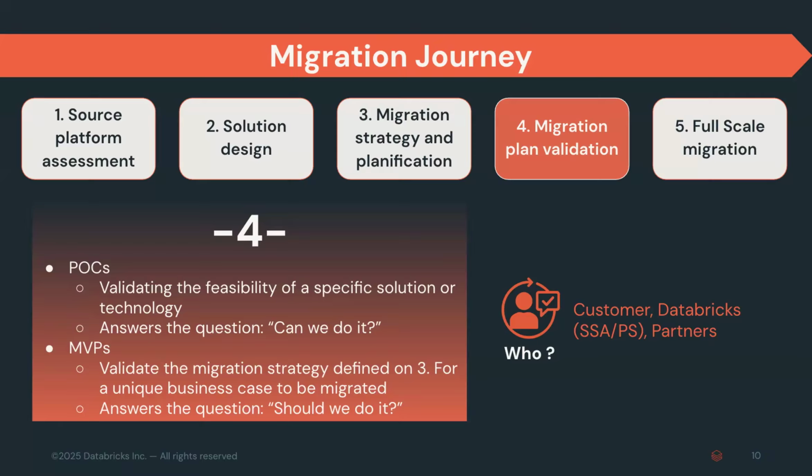And typically this falls into a couple of weeks, 4 up to 6 weeks, I would say, running the POC or MVP, validating all of our assumptions made. This is where the first pipelines and the first assets are being converted. And we're validating, for instance, did our planning process with regards to the automation curve of the tool set prove itself? Did we answer the question, can we do that? Or were our assumptions a little bit incorrect?